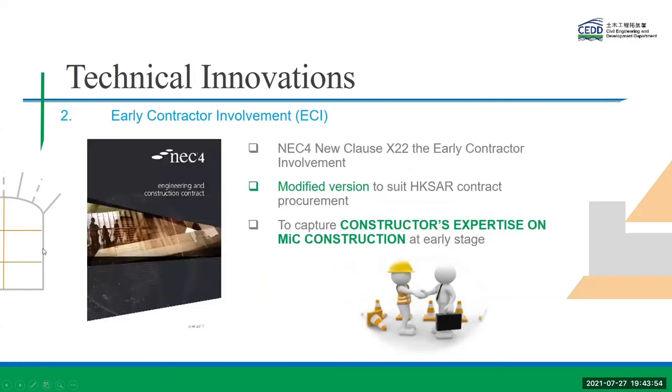When we're using MIC, we need the expertise from the contractor and the module supplier. The earlier, the better. One of the possible measures to capture the expertise from the contractor is the adoption of the early contractor involvement procurement method under the NEC4 documents.